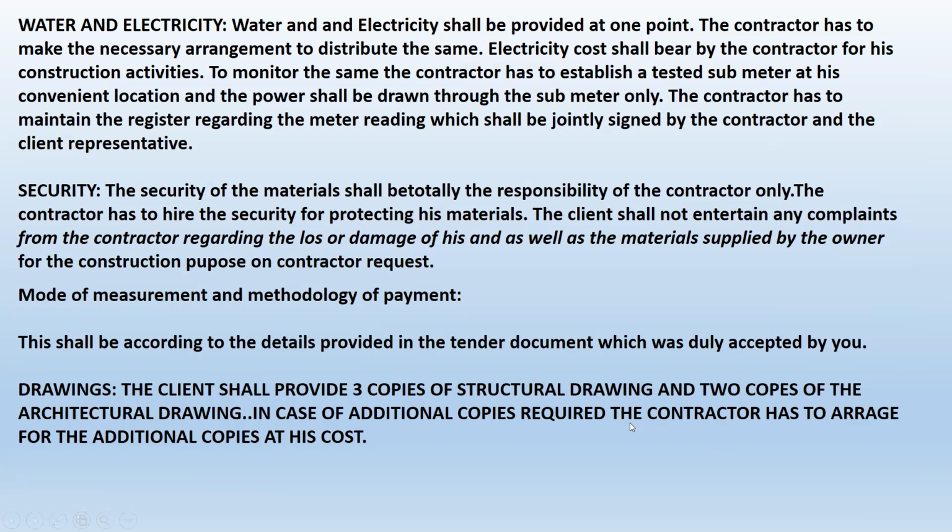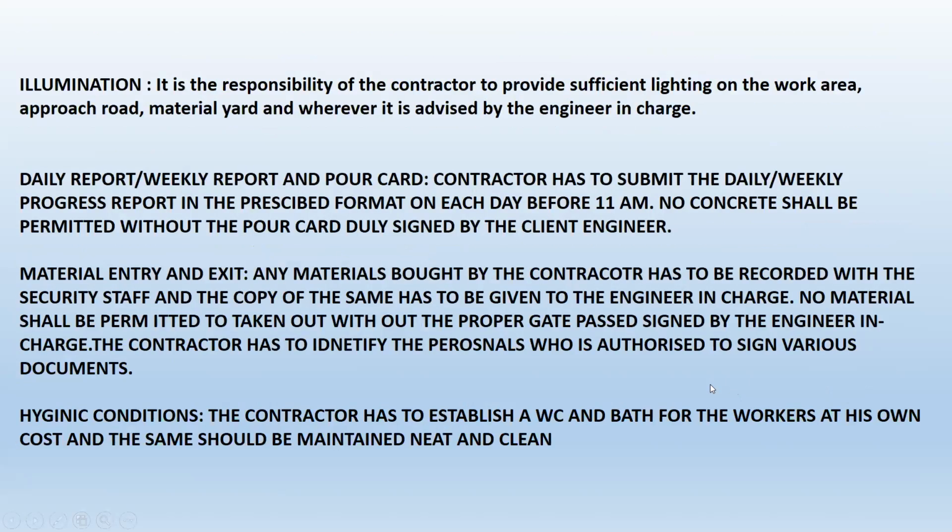Then the mode of measurement has to be identified. How many sets of the drawing will be provided to the contractor, that has to be identified. All these things have to be covered in the work order. This is on a square foot basis. For item rate basis, the work order will differ from this, which will be discussed next time.